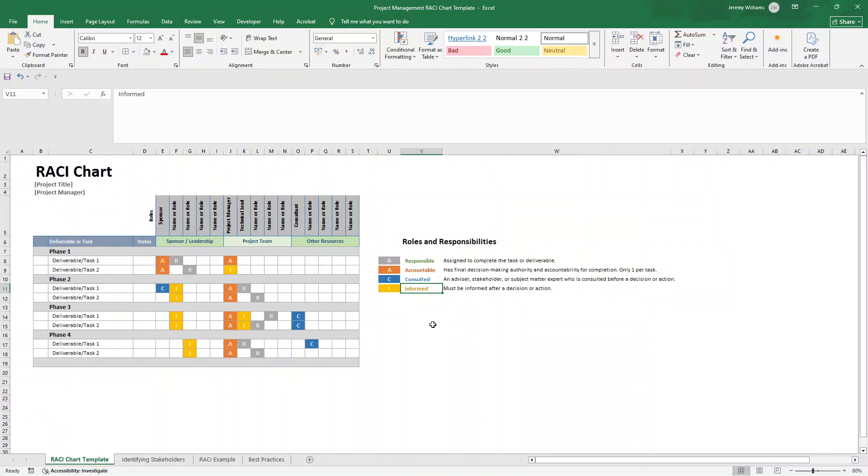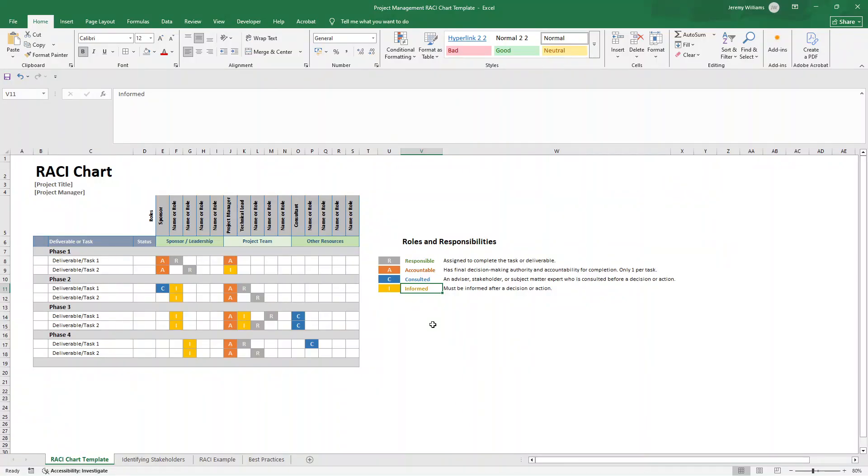So when should you be updating your RACI chart? It shouldn't be set in stone. This is a living, breathing document. So update it when team members change, scope changes, roles evolve, issues arise, or during phase transitions. Typically, review it monthly for long projects or even at each major milestone.